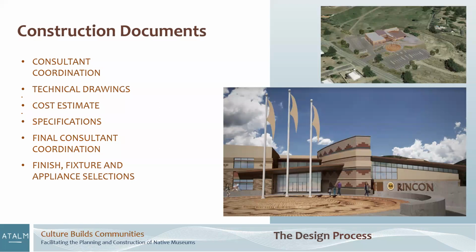We do cost estimates in this. We do specifications that show in a written narrative how each piece of the project goes together, what they're supposed to do, how they prepare surfaces, all that done. And then it's our final consultant coordination so that we don't have steel beams where we need mechanical ducts, or we don't have an electrical bus riser going through a fire stair condition.